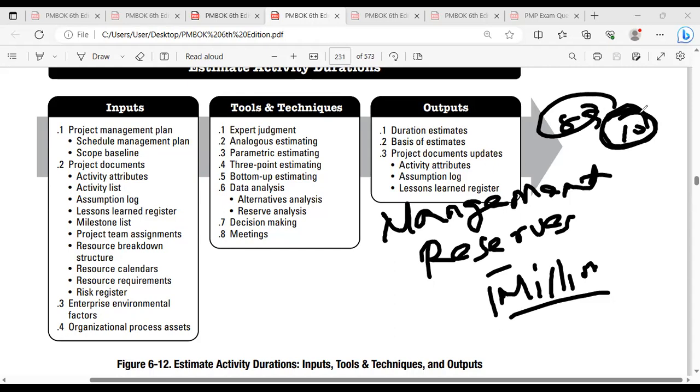They are planning this 10% and they will try to keep it to themselves. They don't want to expose it to the project managers, but for the overall project they'll be keeping these funds, 8 to 9% of the total project value. They will not expose how much they have as a management reserve. This is planned for business continuity. The management reserve, that 7% or 8% overall from the budget, is based on the unknown.